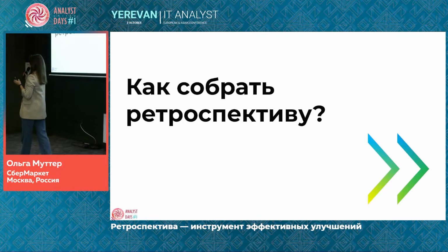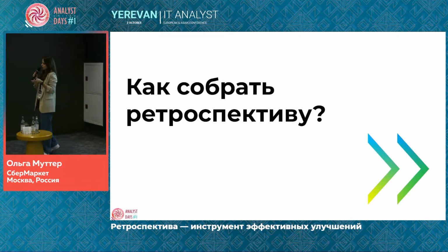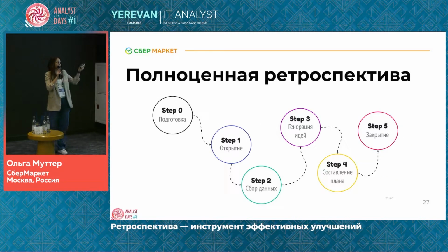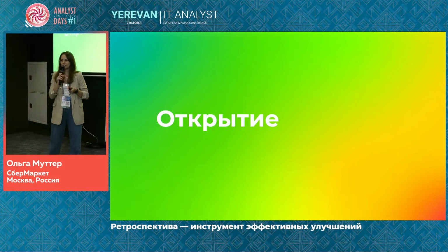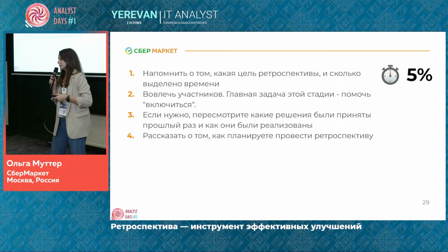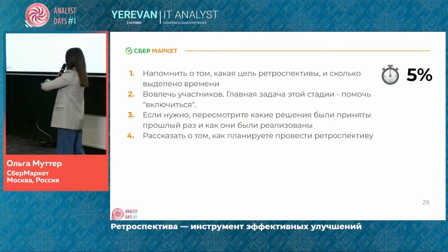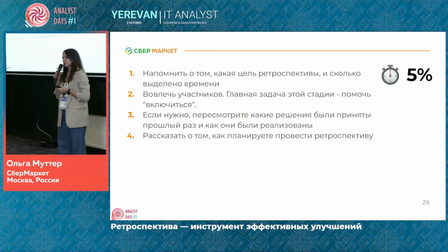Then, after the preparation, retrospective has to be put together. What do we start with? We spoke about the first step, but there are other steps involved. And the first step would be the opening. The opening takes about 5% of all the retrospective time. We use it